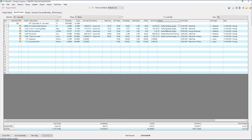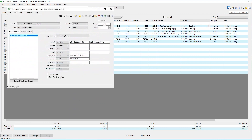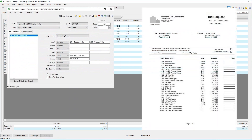Vendors are easily assigned to the individual items that need to be purchased, or subcontractors that will be used in the estimate. If you need to choose between different vendors or subcontractors, bid requests can be sent out to acquire the pricing.